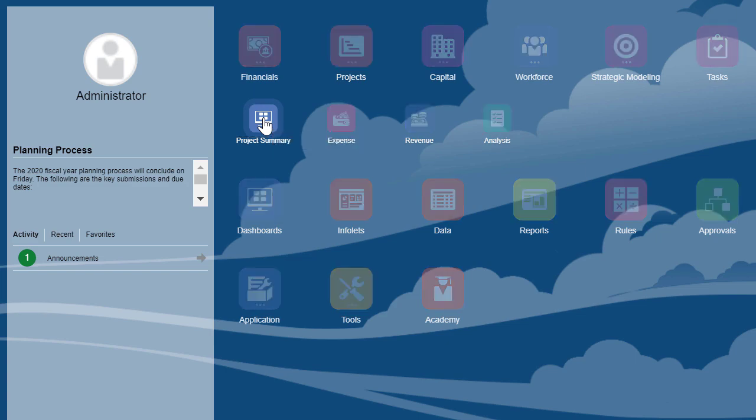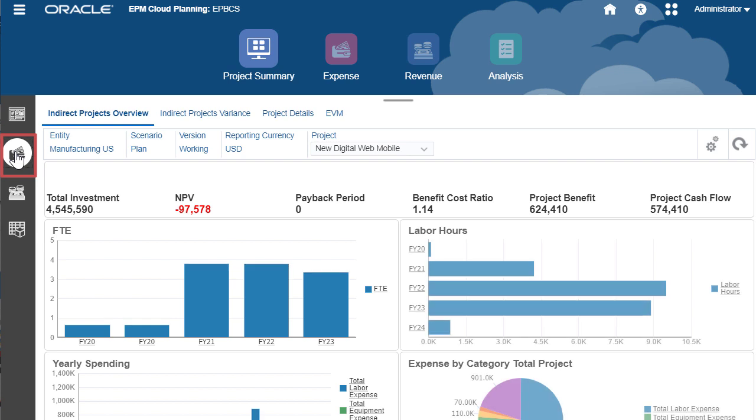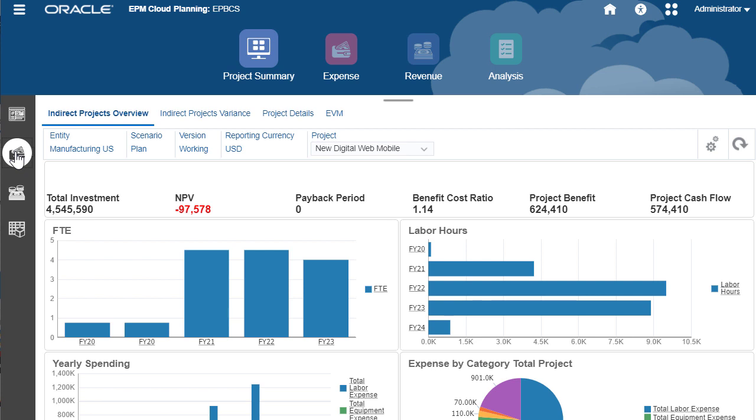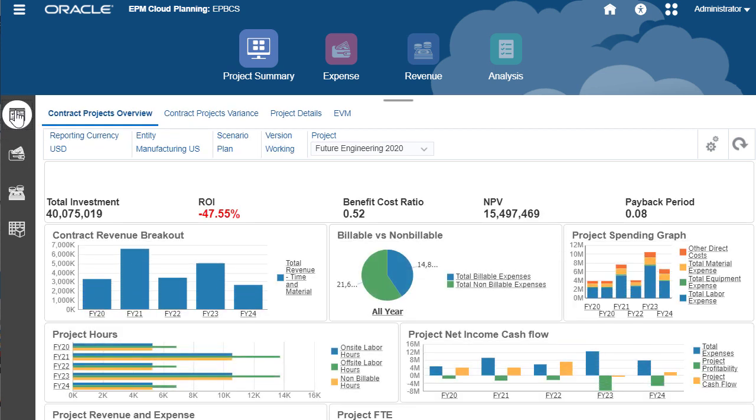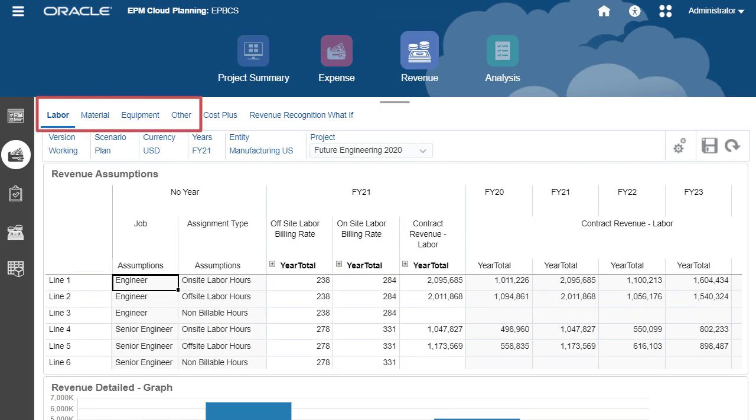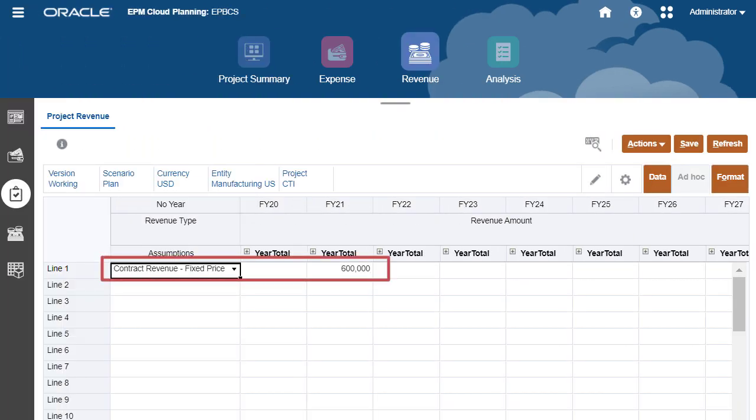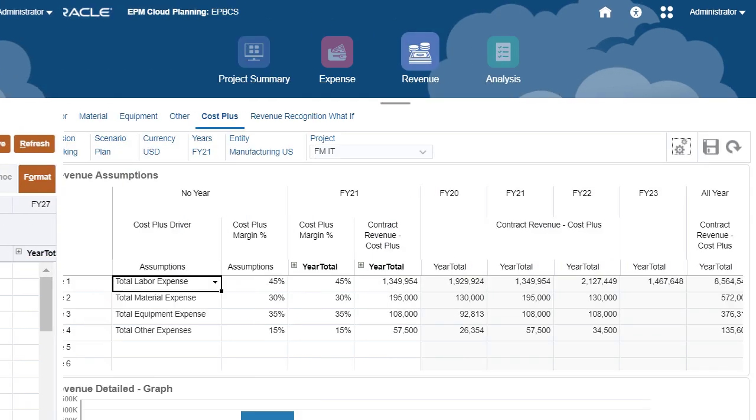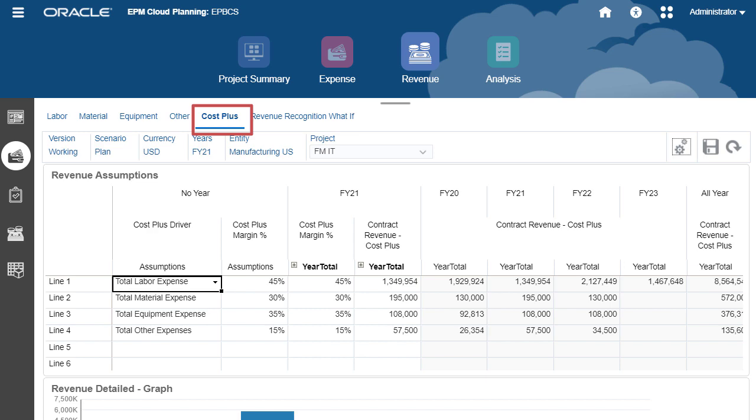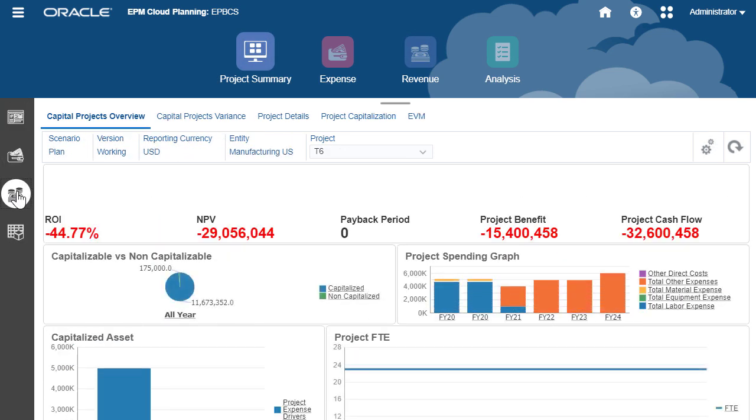With projects, you can perform project-based planning for indirect projects to manage internal non-revenue generating projects such as IT, marketing and R&D. Contract projects to manage revenue generating projects which can be time and material based, fixed price based or cost plus based, and capital projects to manage your capital investments that involve large financial commitments.